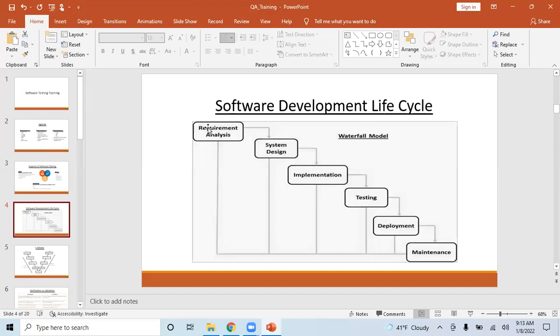And this will be part of stories. When I say shopping cart is a feature, it is also called an Epic in Jira. Under that Epic, there will be multiple stories, and those are again the sub requirements, so low level requirements for a high level requirement, right? All these will be documented in Jira. So the outcome of this requirement analysis is user stories, or a very high level system design, or very high level features.